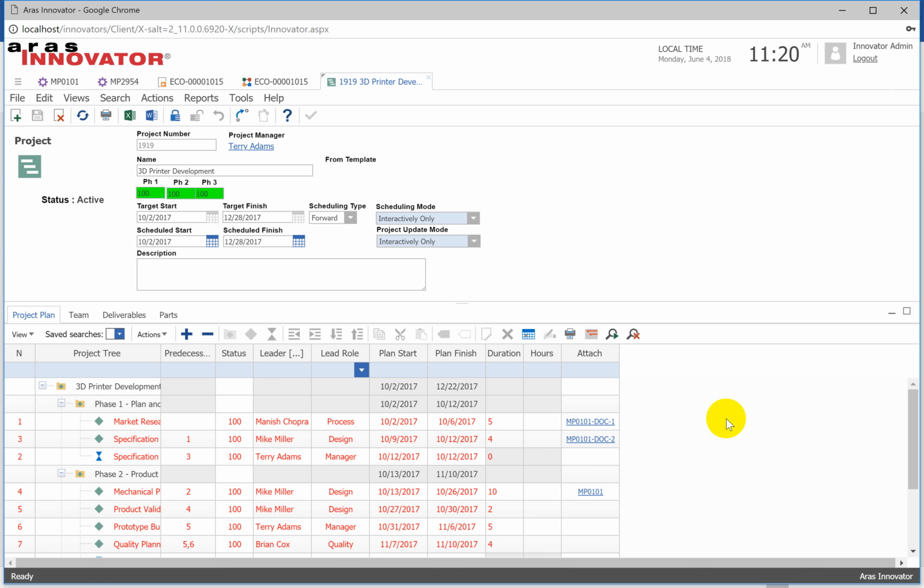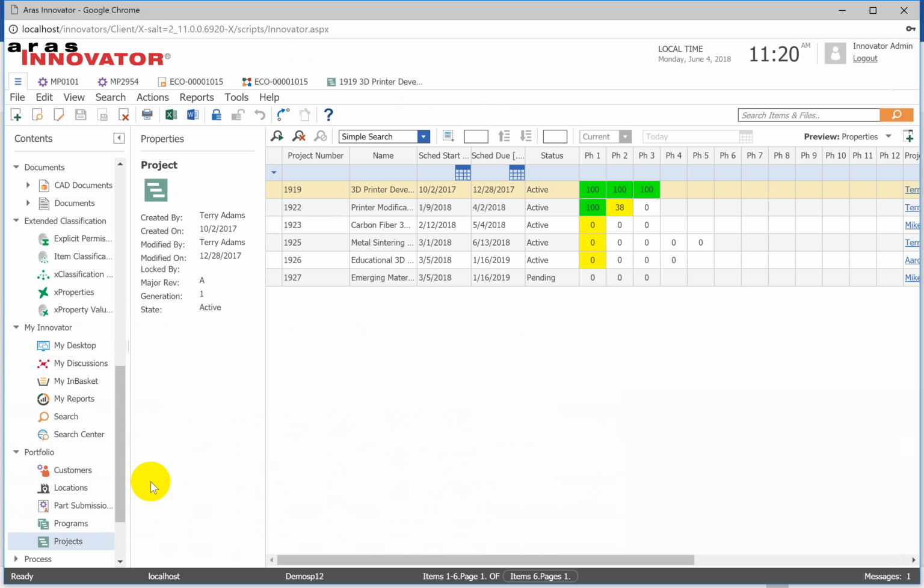That automatically gets updated, and it gets escalated when those tasks are not complete on time, and the individual gets a message, and so does the manager, saying this task is late, and then they can work on resolving that lateness. So project is a very powerful application that's provided as part of the ARIS platform, but there are others as well.